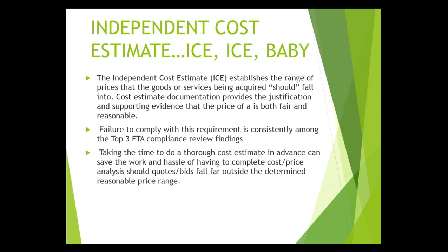So the independent cost estimate establishes the range of prices that the goods or services you're acquiring should fall into. This cost estimate documentation provides the justification and the evidence that the price is both fair and reasonable. Taking time to do a good, thorough cost estimate in advance can save the work and hassle of having to do a complete cost analysis should quotes or bids fall far outside what has been determined to be a reasonable range.